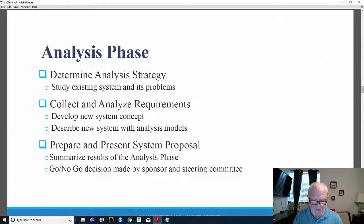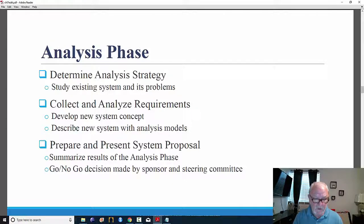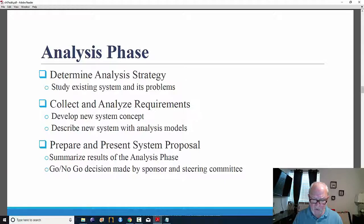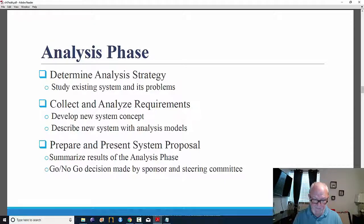Collecting and analyzing the requirements is key, and you must gather them in a proactive, detailed way, including interviews and questionnaires. The system concept will be built on some sort of a requirement statement and on the basis of business analysis models. How will the business operate if the new system is developed? System proposals will be prepared and presented. The system proposal is a key deliverable that combines all of the above into one document. Eventually, there will be a go-no-go decision made by the sponsor and the steering committee. The system proposal describes the requirements that the new system should satisfy.